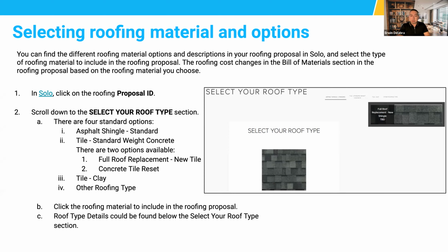They're more common in Florida, but I know in California we do have some construction homes or homes existing that have clay tiles. In order for us to put solar on that clay tile, we wouldn't be able to penetrate the clay tile directly like we would with concrete. We'd have to remove those and then do what's called a comp inlay. So we remove the clay tiles from the whole roof plane, like the whole square, not just the section where solar goes, it's the whole square, the whole roof plane.